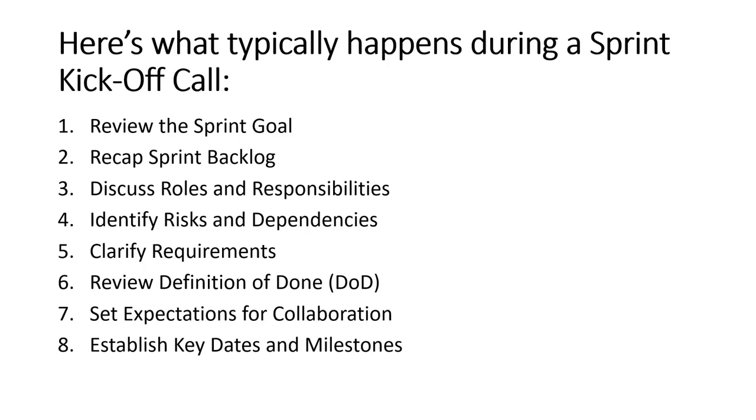And we also identify risk and dependency. Based on the user stories, we check if there is any risk involved, or if there is any dependency on an external system, and we need input from another system related to any integration. If the user stories are focusing on the integration part, then we will discuss all the risks and identify any risk involved while doing our work for this sprint, right?